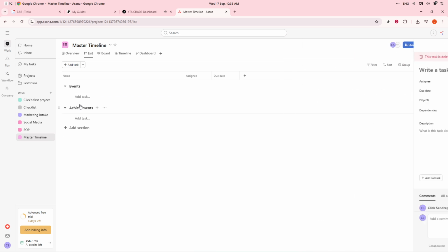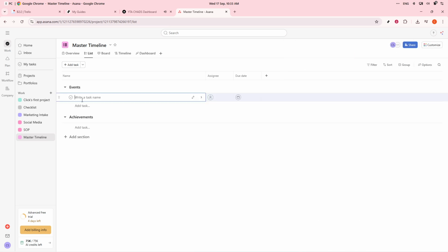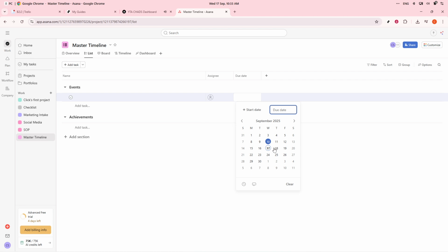Additionally, you can enhance accuracy by employing task dependencies. Select a task and click on Make Dependent On, connecting it with others to see which tasks need completion before the next begins. This method helps in preventing scheduling overlaps and allows for a more streamlined workflow.